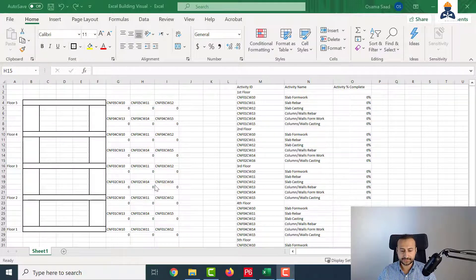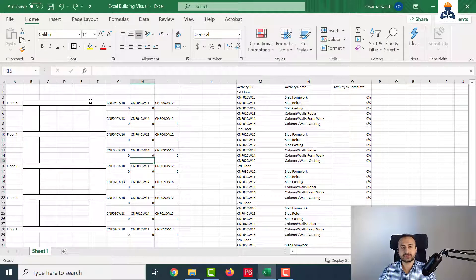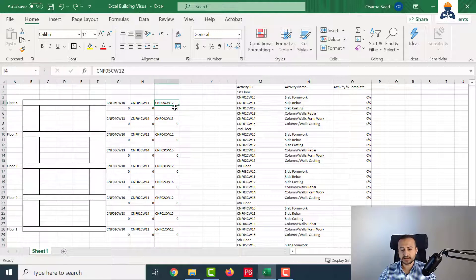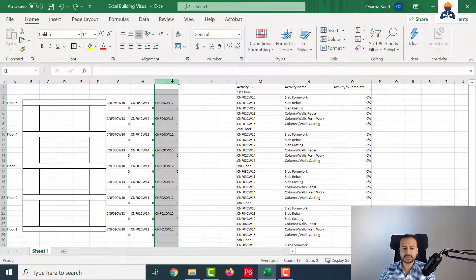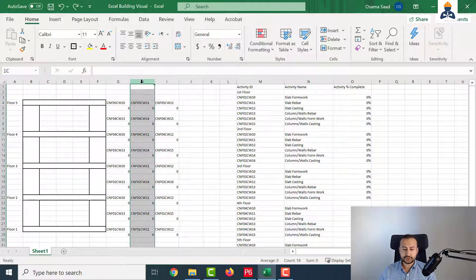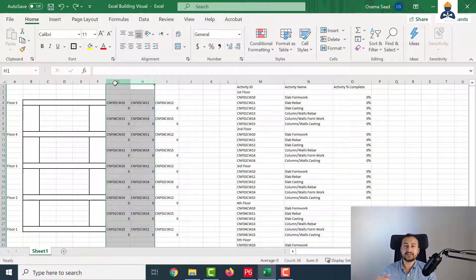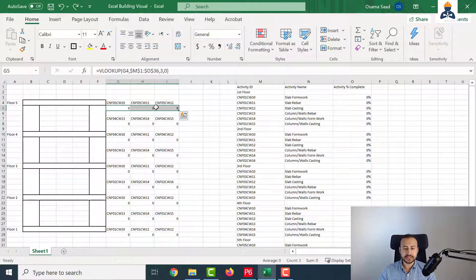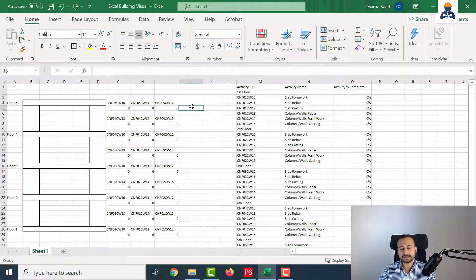Based on all these data, I want to determine if the element is completed, in progress, or not started, and I want Excel to do it for me - I will not do it manually. If this last column - the casting - is completed, it means the whole element is completed. That is the last milestone. But if it's less than 100%, for example 80%, then the whole element is in progress. For the other two columns, if I have a value greater than 0, it will also mean in progress. But if all three values are 0, it will be not started.